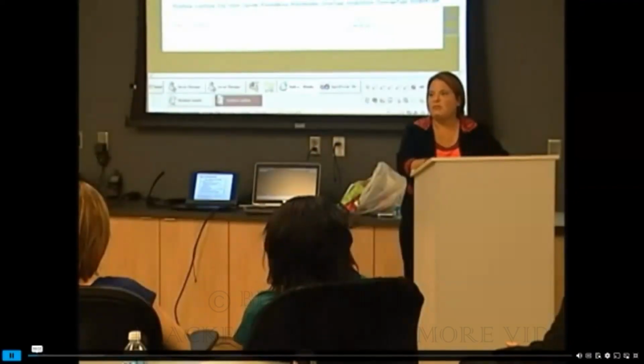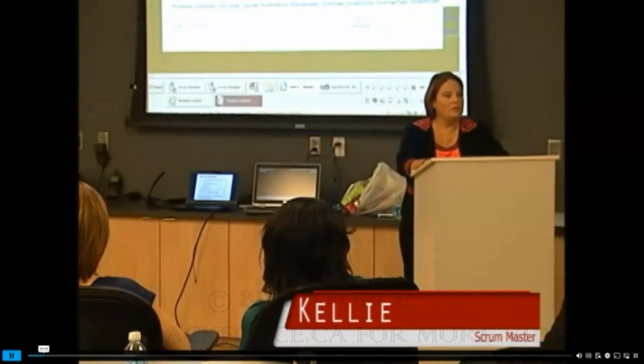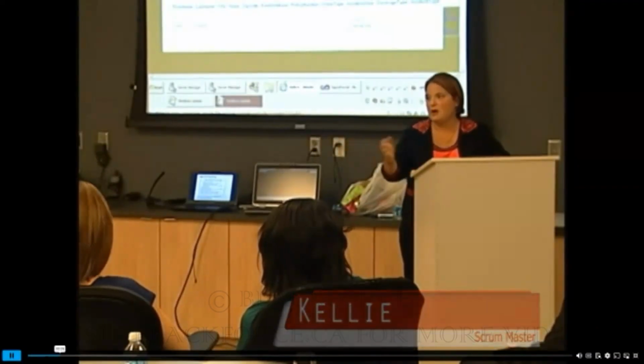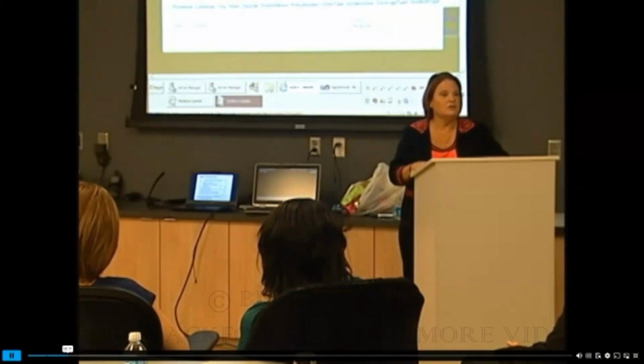What this sprint review typically is, we show you what we've done. You provide us feedback. If you have any additional requirements, the product owner, Melissa, will document those and make sure we add them to our backlog based on priorities and stuff like that. So with that, Melissa, would you like to show some of the great working software?